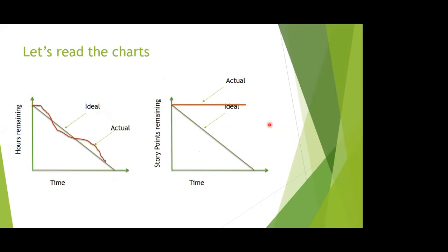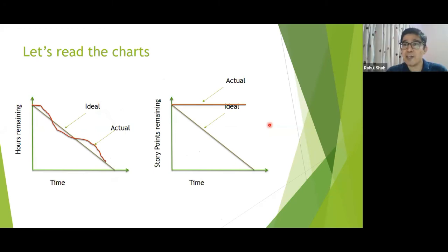Yes. Because we consider story points to be burned only when all the subtasks of it are done. So there could be a situation where 90% of the subtasks were done and just one was left, because of which it is showing this line. Yeah, very true.